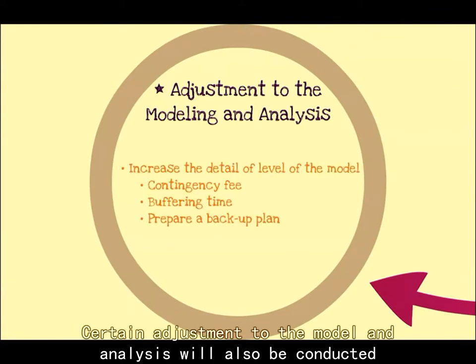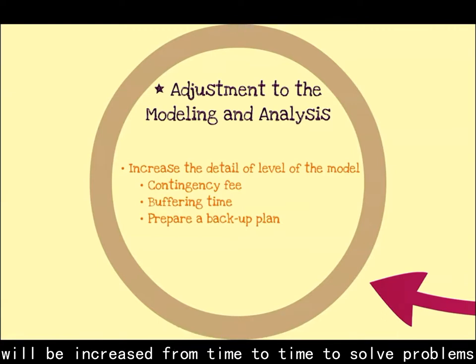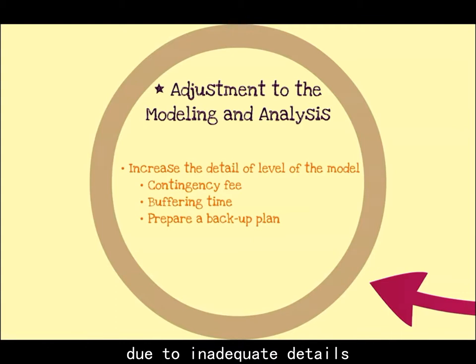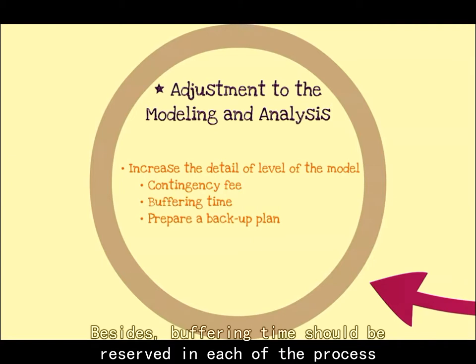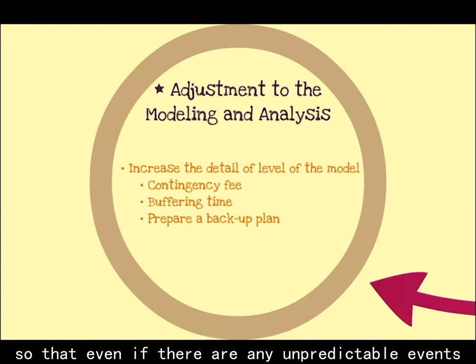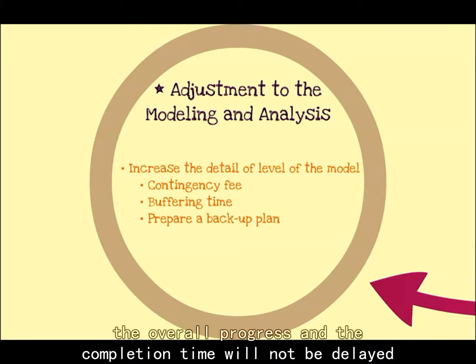Certain adjustments to the model and analysis will also be conducted. For example, the level of detail of the model will be increased from time to time to solve problems due to inadequate detail, and avoid confusion and misunderstanding. Besides, buffering time should be reserved in each of the processes, so that even if there are any unpredictable events which cause delay in some stages of the project, the overall process and completion time will not be delayed.